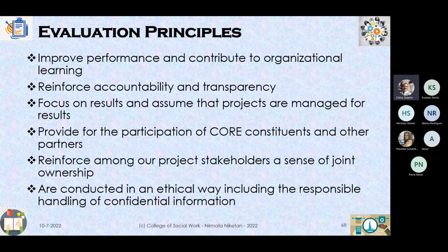I was telling you that this could come up especially when you're doing a financial audit. I didn't do too much financial audit, but basically program matching and financial audit I used to look at also. I was giving examples of a training program. X amount has been spent. You have a training program which was allotted 20,000 for X number of participants. You will examine how many participants have attended, what the sign-in sheets are, what the photographs are, what case studies have emerged, lots of things. You will look at lots of indicators and tools. You'll use a few tools.